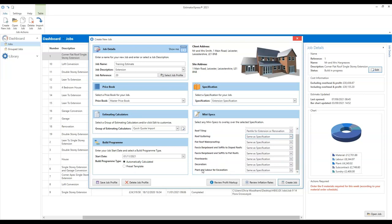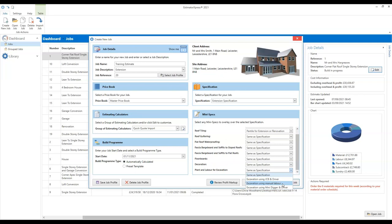A quick one to say for the plant and labour for the excavation — as mentioned, when you're using an extension specification it will default to using a mini digger. However, if you're working where space is really limited and you're having to use manpower to dig the excavations, then there's a manual labour option there.